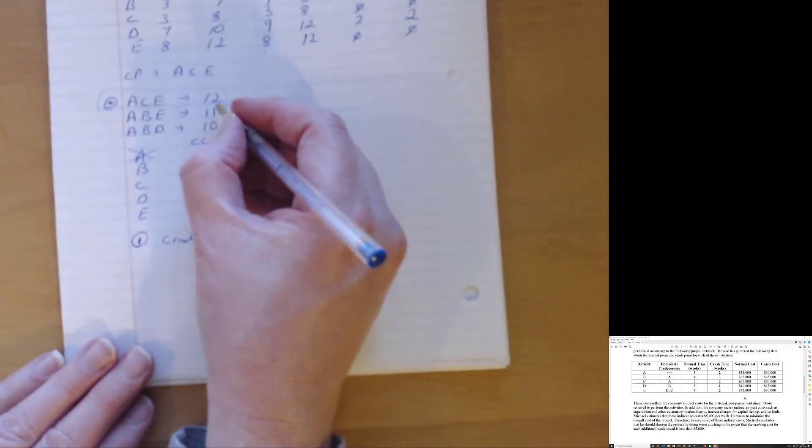Now, when I do that, that reduces how long the project takes. Scratch that out. Go to 11. This stays at 11. That stays at 10. Well, that's interesting. Now I have two critical paths.